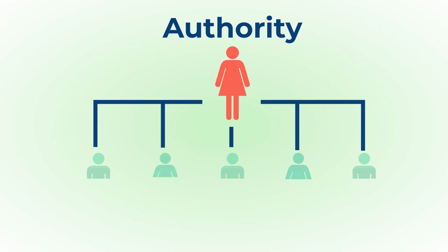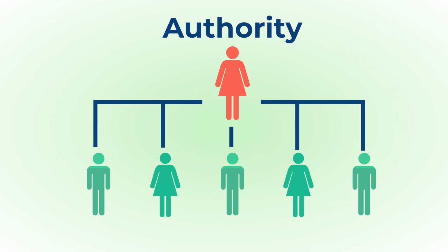You can narrow down the number of stakeholders by focusing on the ones with authority over other stakeholders. For example, if the whole accounting department are stakeholders in your upgrading accounting software project, you might want to focus on the chief accountant rather than the junior accountants. I am not saying you should totally ignore them, but don't spend too much time on every single one.